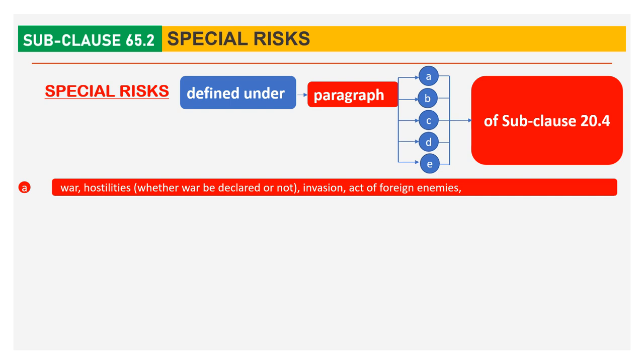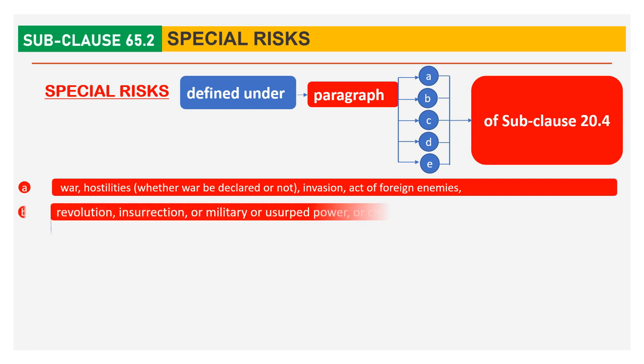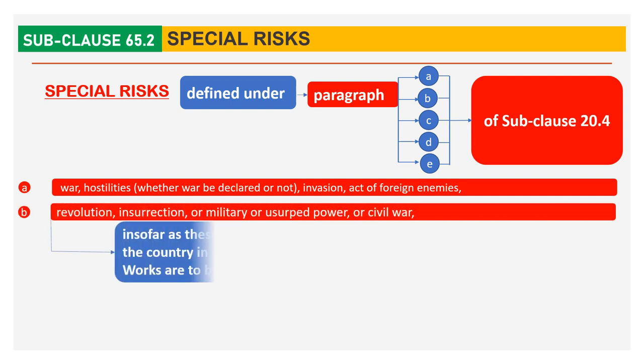Risk A: War, Hostility, Invasion, Act of Foreign Enemies. Risk B: Revolution, Insurrection or Military or Usurped Power, or Civil War, insofar as these relate to the country in which the works are to be executed.